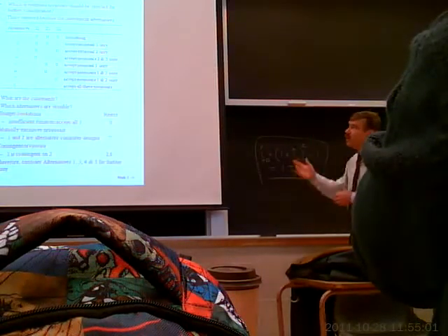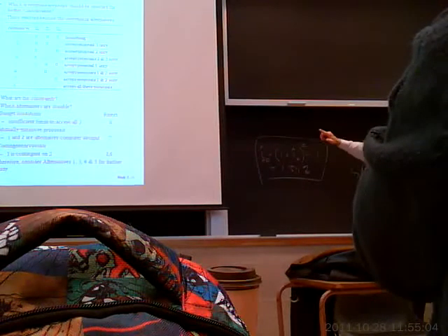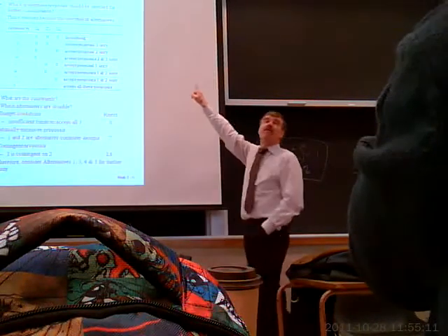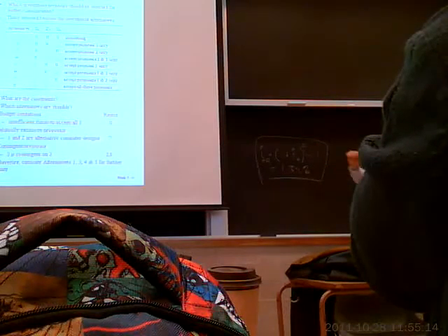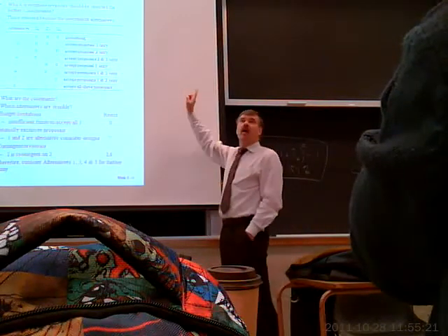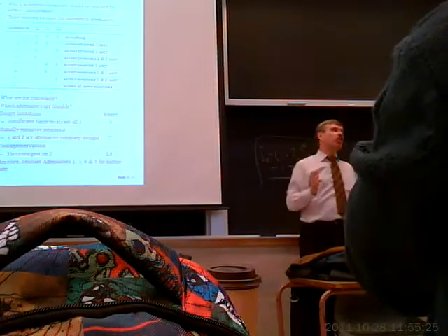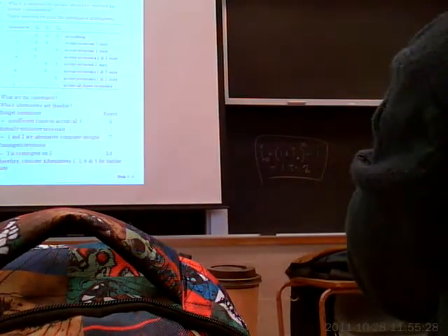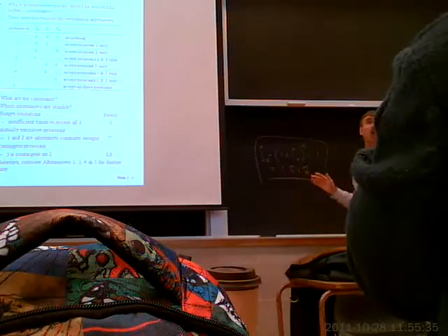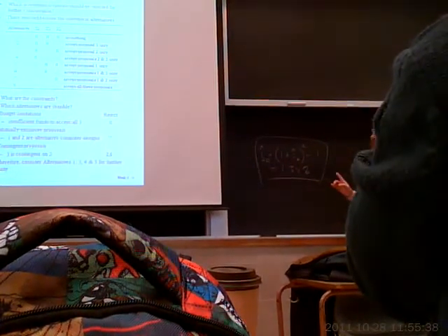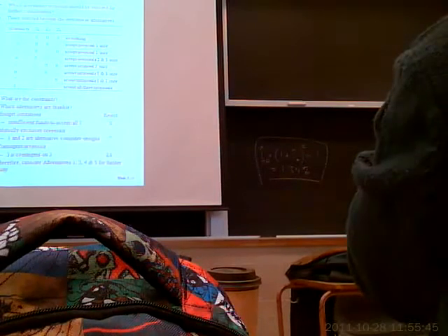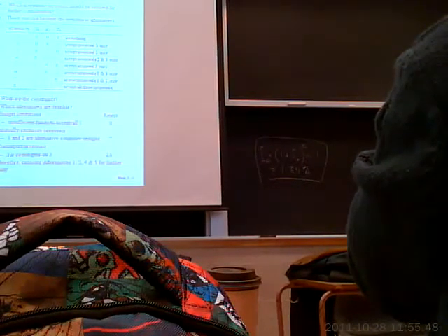So I've got contingencies. And if I look at these constraints, I can take my initial 8 alternatives and whittle them down to 4, where one of them is do nothing. If none of these alternatives have a positive rate of return, I'm going to do nothing. The only consideration with do nothing is that occasionally I've got a mandatory project. Let's say I've got a pollution control project that I need to comply with the law, and there's no option not to do it. Well, then do nothing is not an option, and I want to choose the minimum cost option or the minimum loss option to comply with the law. But by and large, do nothing is an option. If the projects are not worth doing, then I'm not going to do them. And so alternative 1 is the way to go. So I want to basically do that.